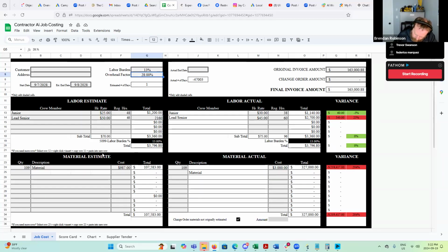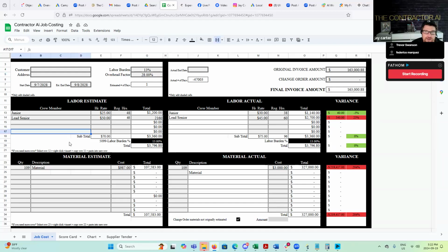Okay. All right. So next, we're going to get down into the labor side of it. Again, this is where we were just discussing, but ultimately we have our labor. So these are employees or staff members. All right. And what we want to do is be able to call our shot. Every job, you need to get into the business of calling your shot. So if you have estimated 14 days on a job and it takes 28, well, that's a pretty big wound to lick, but if you don't learn from it, you're doomed to make the same mistake again.